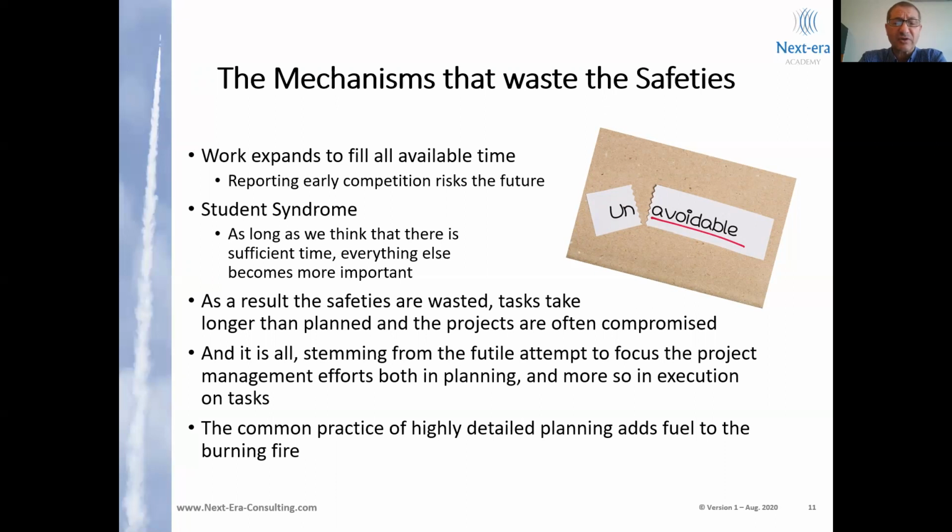The second one is called the student syndrome, that says that as long as we think that there is enough time, everything else becomes more important. And commonly, if we have some level of safety in our task estimate, we do believe there is time. So it is common that we do not start a project as early as possible, as we do not feel the stress yet. The result of these two phenomena is that safeties are wasted.